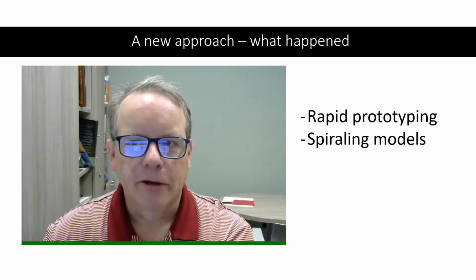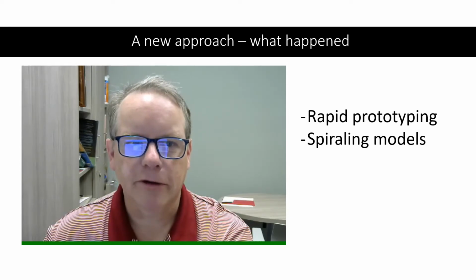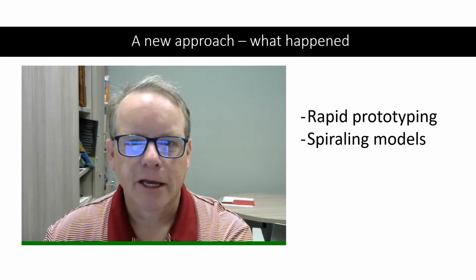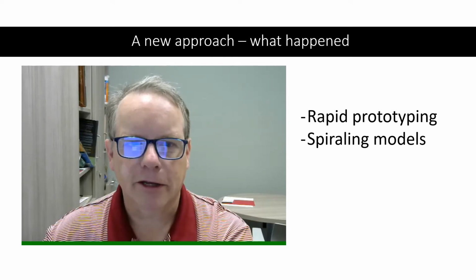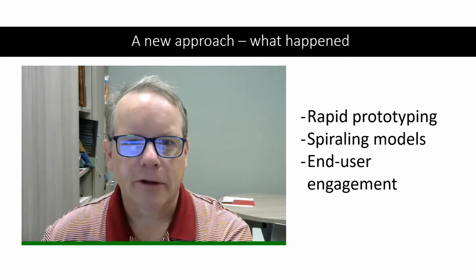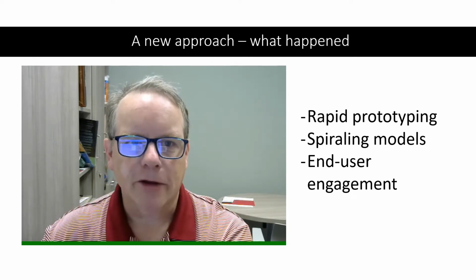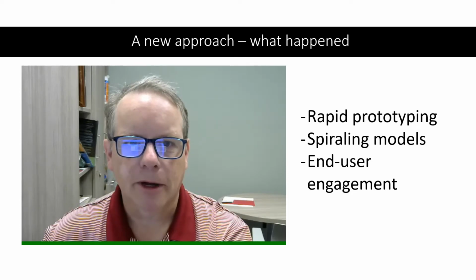For instance, we might first develop a user interface which has no logic behind it. Buttons are present on the page, but they don't do anything when pressed. A follow-on release may then add page navigation, but no verification of input or business logic is applied. Each release adds a bit more functionality and expands the scope of the final solution incrementally. The spiraling approach allows us to engage end users very early in the process. Seeing a web page design on paper, versus being able to use it.